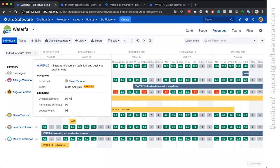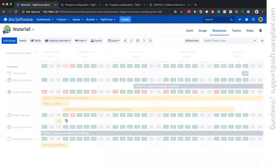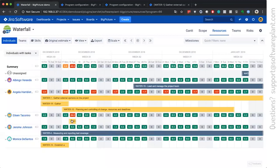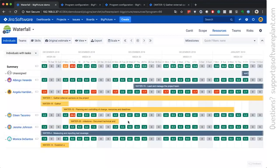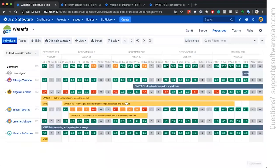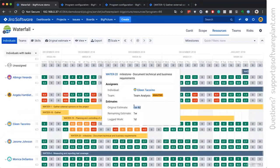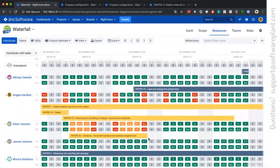When the original estimate is one week, four days, it means that ideally this person needs one week and four days to finish the task on time. And the way that big picture behaves is it divides the effort, which is original estimate, by the duration. Duration is taken from the plan.